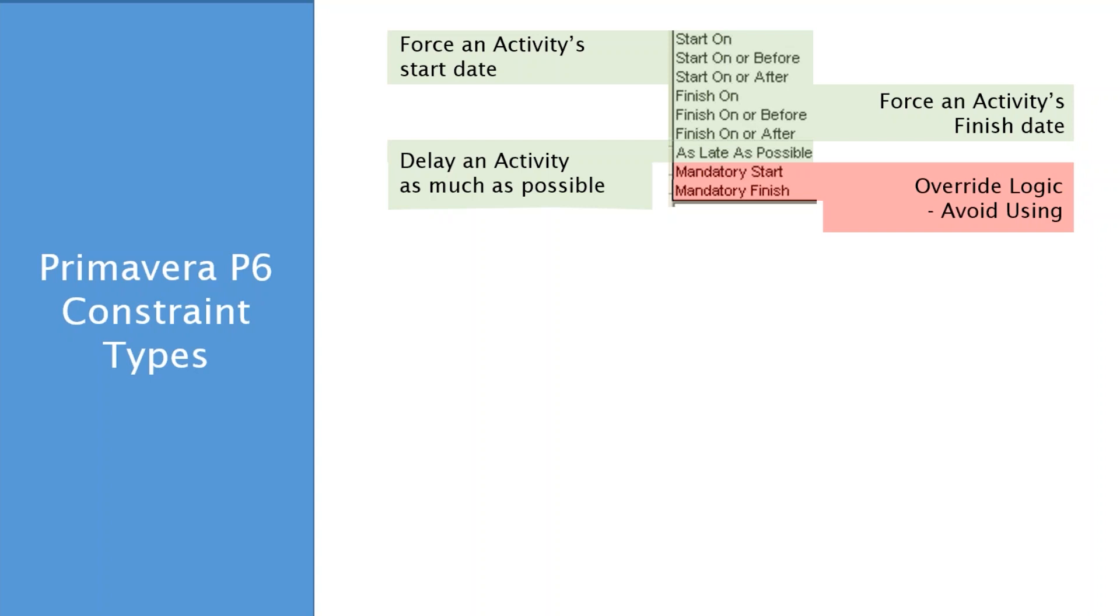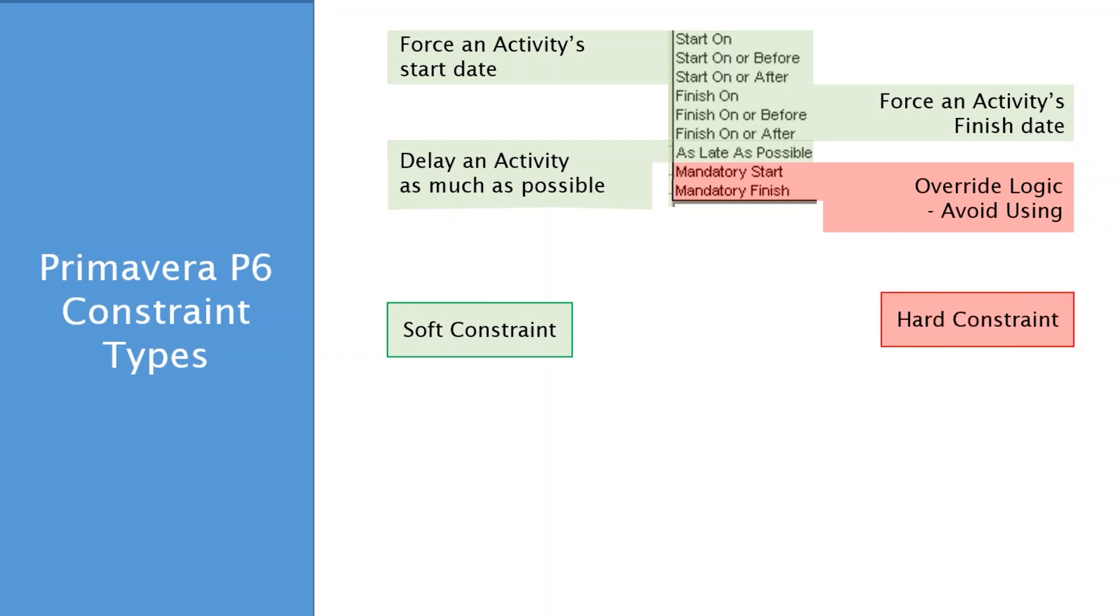Notice the color scheme here. I've got some green and I've got some red. So the guys that are highlighted in green, all the start on and finish on, they're what we call soft constraints. And the guys in red are what we call hard constraints. And you will find that term in your PMI PMBOK and elsewhere in the literature. Hard constraints and soft constraints. And here's how they're implemented in P6.